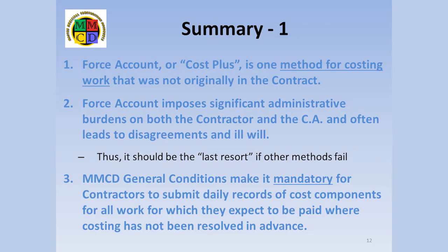So let me summarize. 1. Force account, or cost plus as it is sometimes known, is an accounting method for additional work. 2. The force account method should be the last resort because of the extra administrative burden and the potential for disagreements and hard feelings that it can generate. 3. MMCD makes daily submission of force account forms a mandatory prerequisite to evaluation of entitlement regarding payment for additional items.